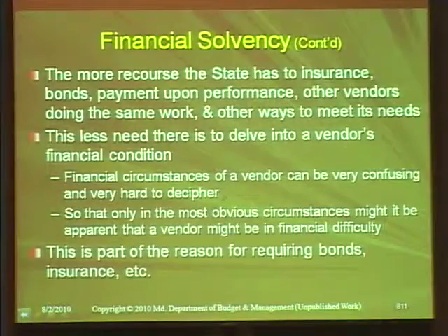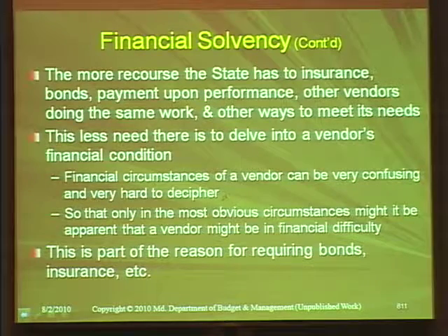The more recourse the state has to insurance, bonds, payment upon performance, other vendors doing the same work, etc., and other ways to meet its needs, the less need there is to delve into a vendor's financial condition. So that's why you have to make a decision as to whether this is something where you want to go. Financial circumstances of a vendor can be very confusing and very hard to decipher, so that only in the most obvious circumstances might it be apparent that a vendor might be in financial difficulty, and this is part of the reason for requiring bonds and insurance. There's reasons to do it, there's reasons not to do it.